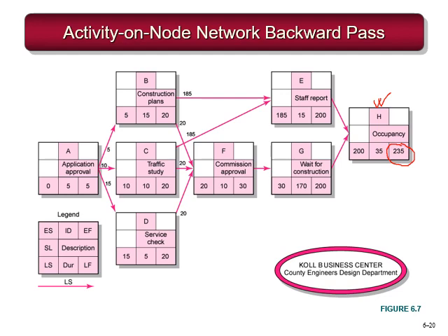So over here we have the early finish, which is 235. So for the end activity, the early finish and the late finish are both the same. So we start from there, 235. If I subtract this 35 from 235, I get this 200. So this 200 is the late finish of activity H.